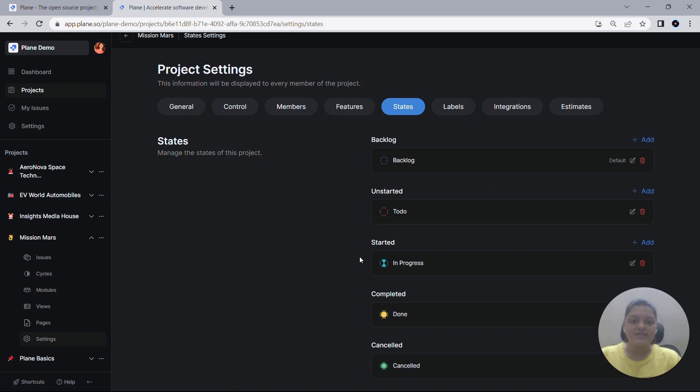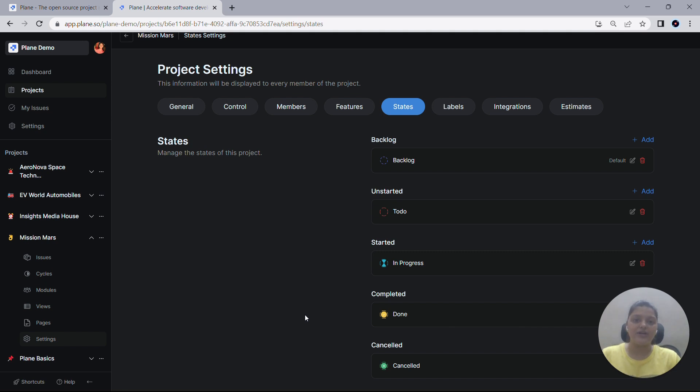These states are Backlog, Unstarted, Started, Completed, and Canceled. These five states play a crucial role in ensuring that all your issues are being tracked accurately. They also provide valuable insights into the progress of your project, allowing you to stay informed about your overall performance.